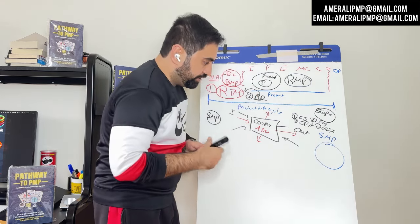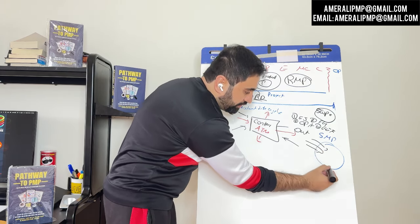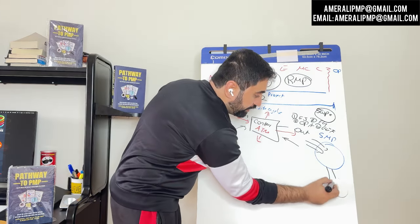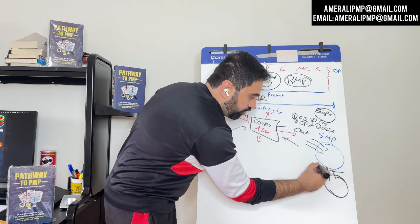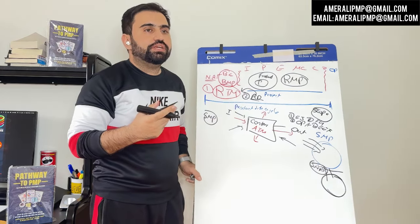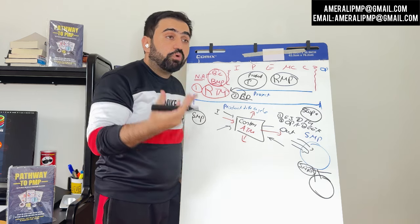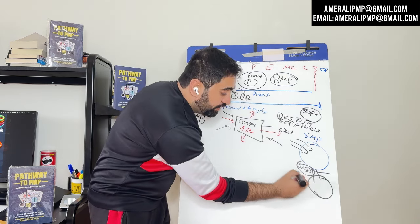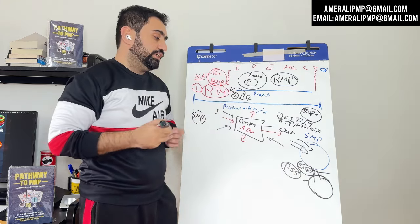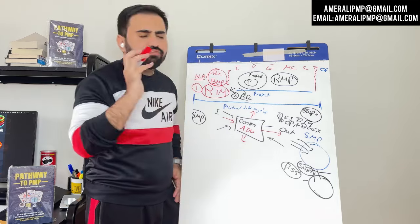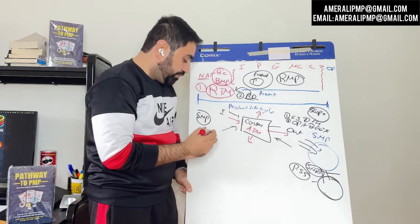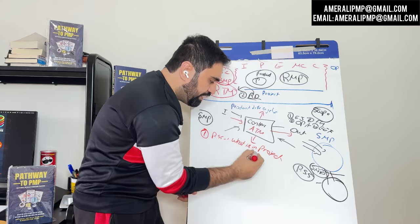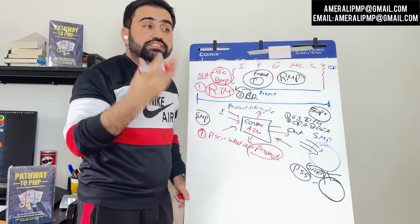Think of it like a funnel. All the requirements in the requirement documentation go into the funnel. We then apply a scope filter using the scope management plan — what is inside the scope, what is out of scope, what is included in the product and what is not, and priority systems like MoSCoW. You collect the requirements, apply the scope management plan filter, and out comes the Project Scope Statement — one of the most important things in the project. It contains everything that must be present in the project, and anything not included in it is not part of the project.